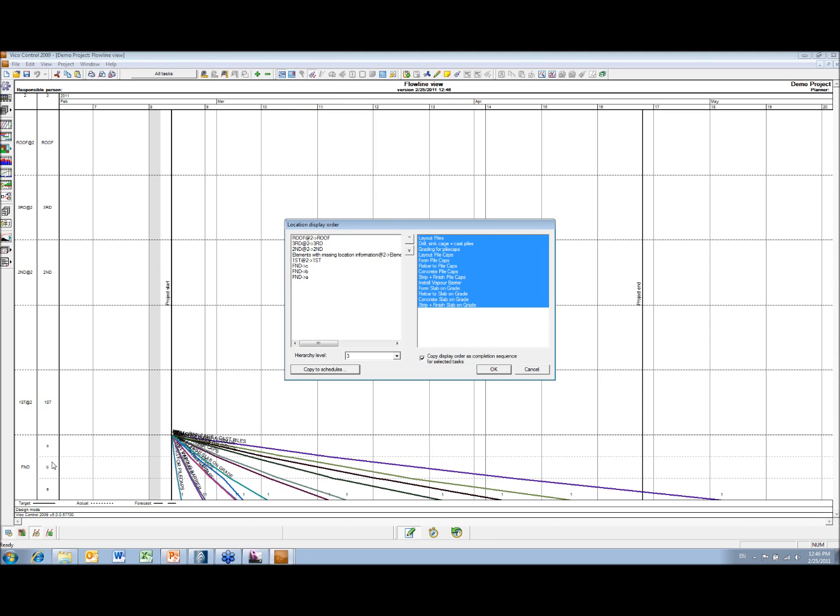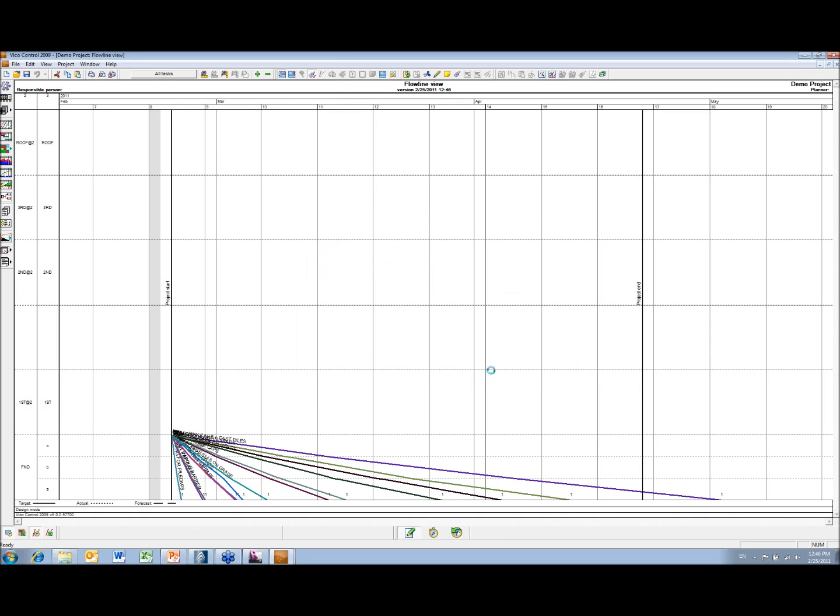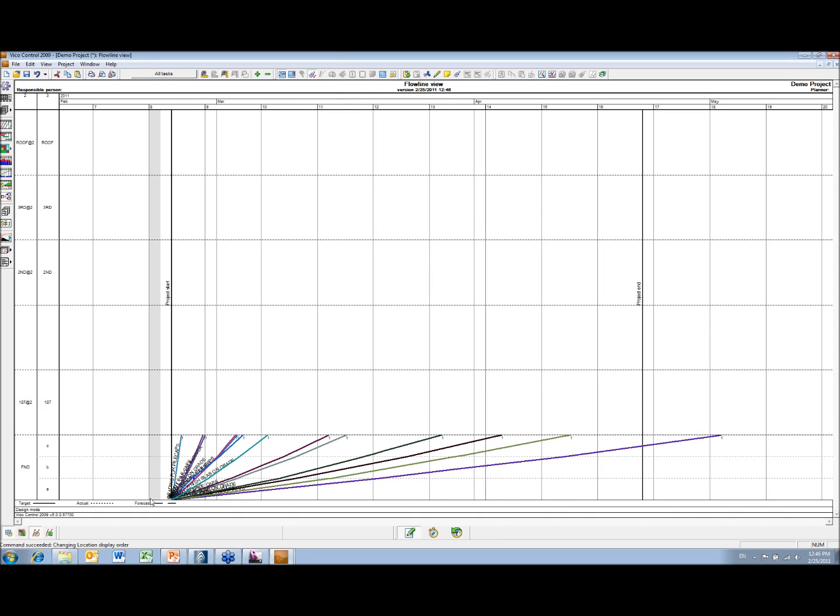So when we have all these locations, we can easily create what-if scenarios by changing how the tasks flow through the locations, and so what-if scenarios and working the way around the building, and we've got lots and lots of flexibility to be able to do that. So you can see these are starting at C and going through to A. I'm just going to turn those around. So they're now starting at location A and going through C.